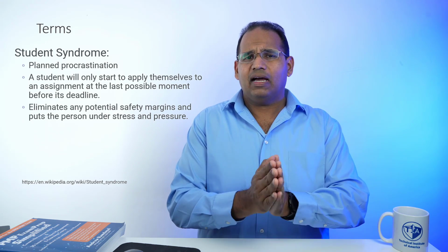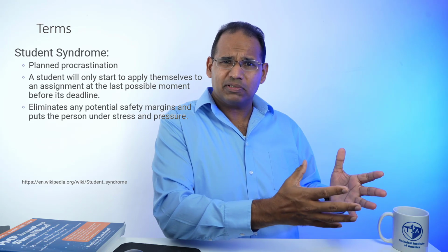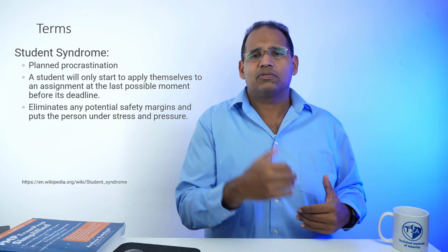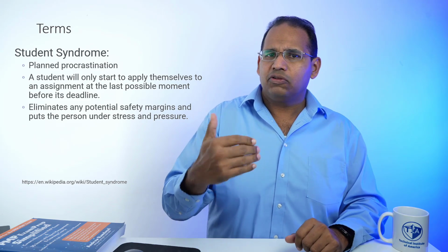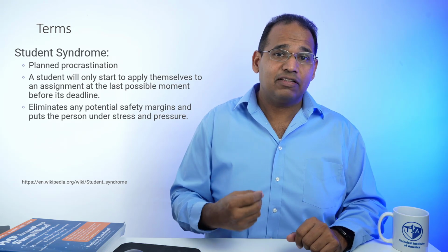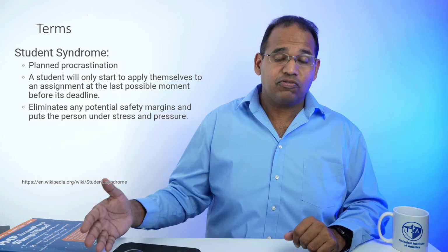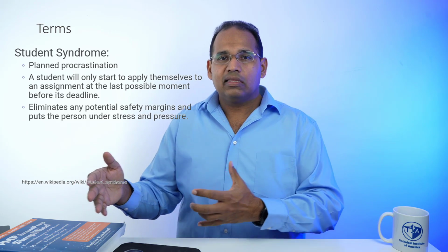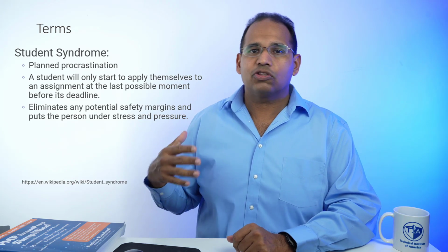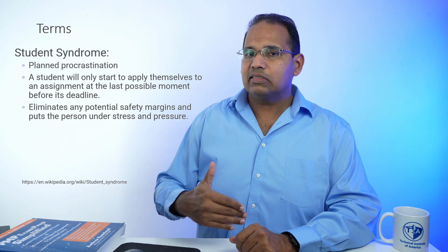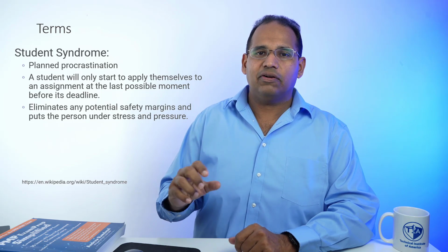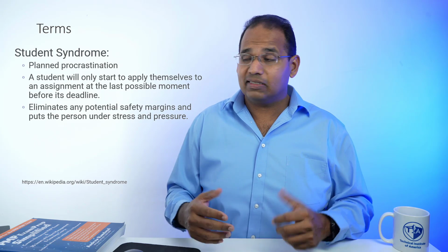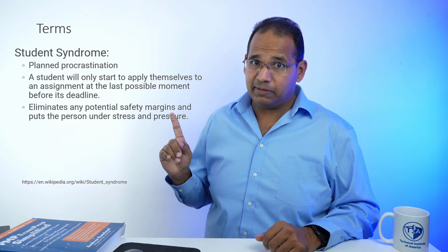Now, how does this apply to project management? You're like, Andrew, I did this in high school too, or college. What does that have to do with project management? Well, here's the deal. Let's say you assign a feature or an activity on Monday to get done on Friday. Instead of the team working on it Tuesday, Wednesday, or Thursday, they wait till the last possible moment, Thursday afternoon, to get it done. This is going to eliminate any kind of slack time or free time they would have if, when doing the feature, something goes wrong. Basically, it eliminates the safety margin of time.